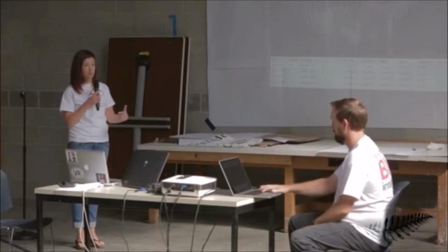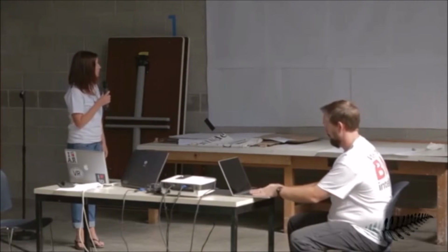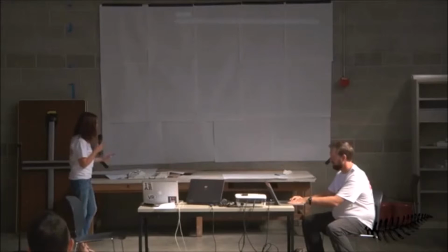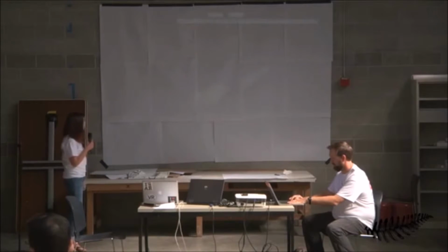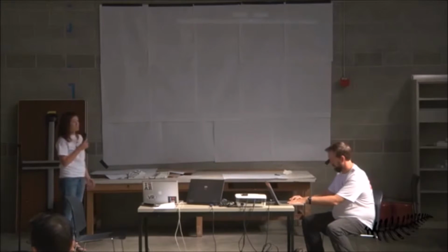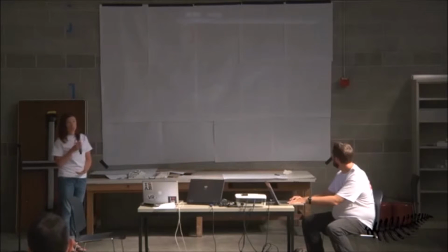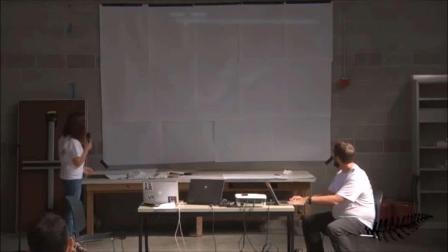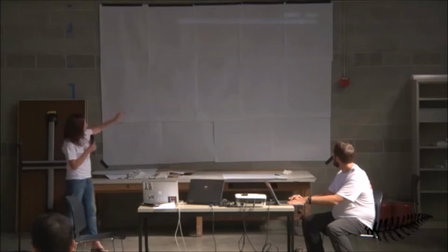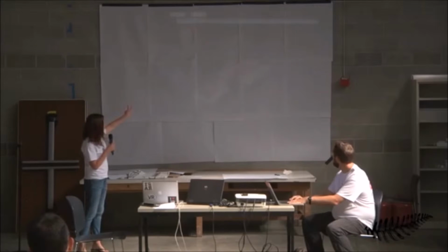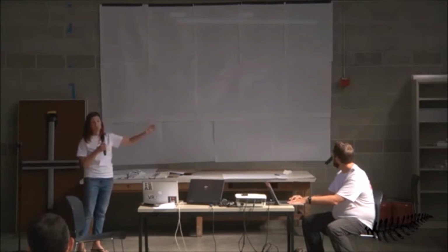So go ahead and move into the simulation. In addition, an additional criterion for STV was to be able to show the objects over time, in simulation. You see the slider bar at the top, which has 2 dates and 2 ranges. So you can either show a time period and what is happening during that time period, or you can show the accumulation of activity over time.